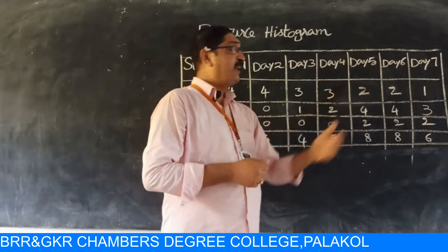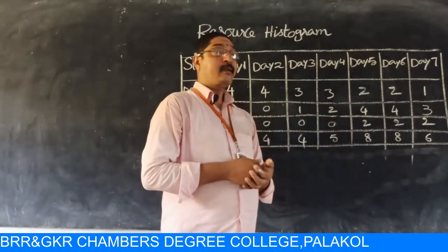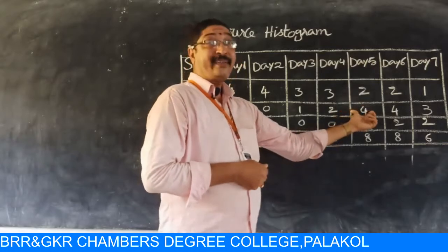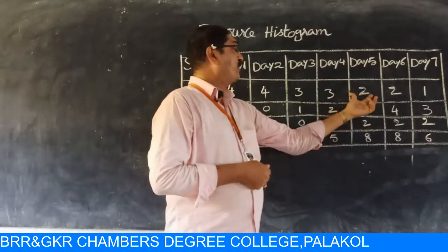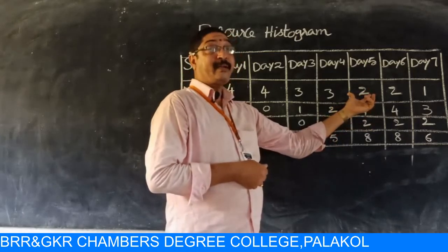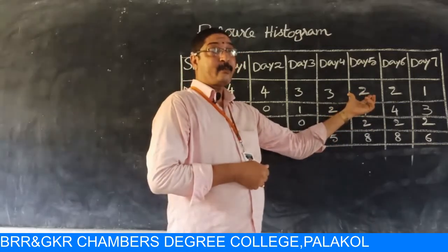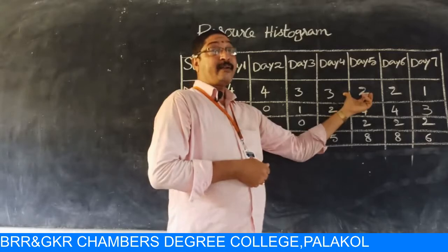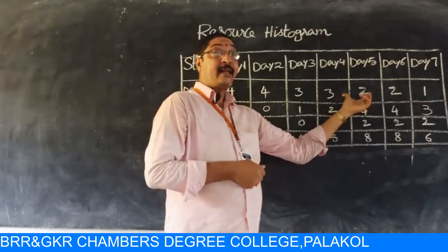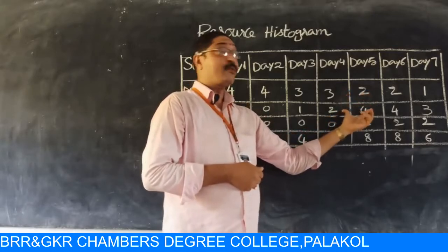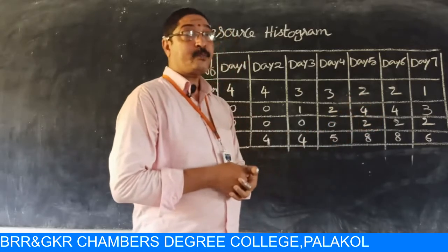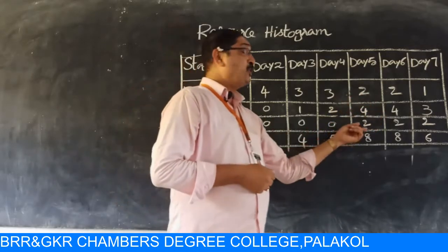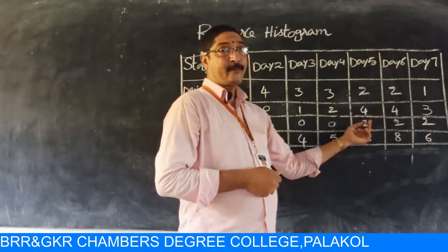If you go to the 5th day, here the developers increased and design has decreased, because most of the designing work will be completed at this stage. So a lot of development work will be pending. To handle that, we increased developers to 4. At the same time, we introduced 2 testers here also.